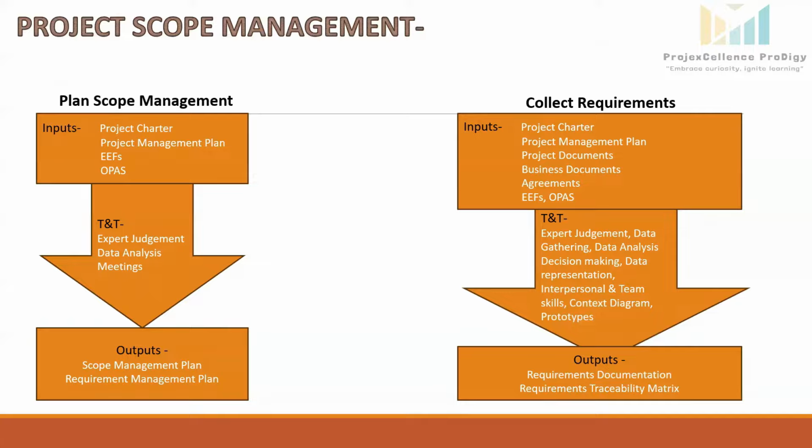Project charter will serve as a foundational document for scope definition. For our solar power plant project, it will outline the key deliverables as installation of solar panels, inverters, electrical distribution system, and commissioning of the whole plant to produce the 20 megawatt power. It will guide scope boundaries, meaning what is in scope or out of scope, like any future expansion or plant operation will be out of scope.